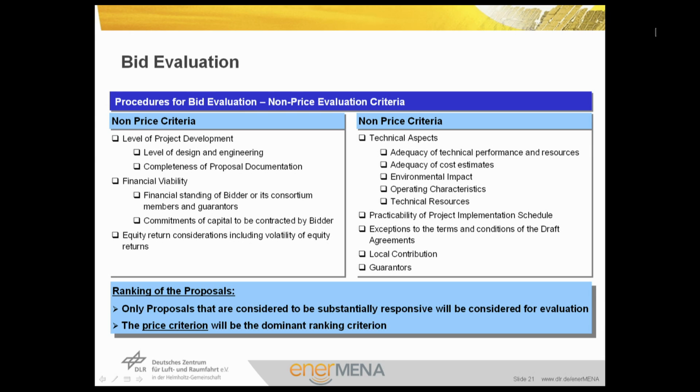The procedure of bid evaluation should be transparent as mentioned and will be based on non-price evaluation criteria for financial and technical aspects. For example, the level of project development, financial viability, equity return considerations, the most relevant technical aspects, practicability, and project implementation schedule.